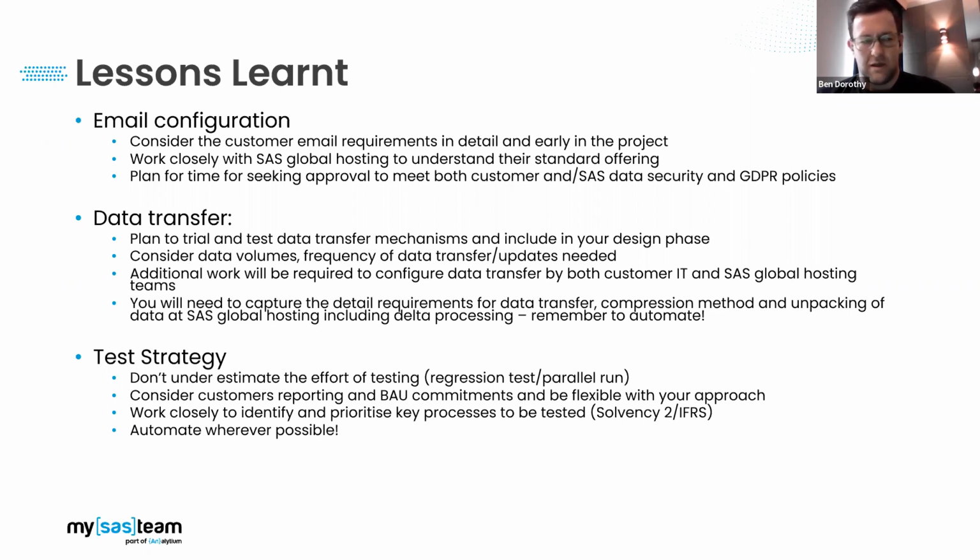And obviously that will depend upon, again, the customer environment and security policies. We need to consider the volume of data and the frequency of data transfer that we need to have, and there's also additional work required to configure that connectivity, and that data transfer between the client and the SAS Global Hosting environment.